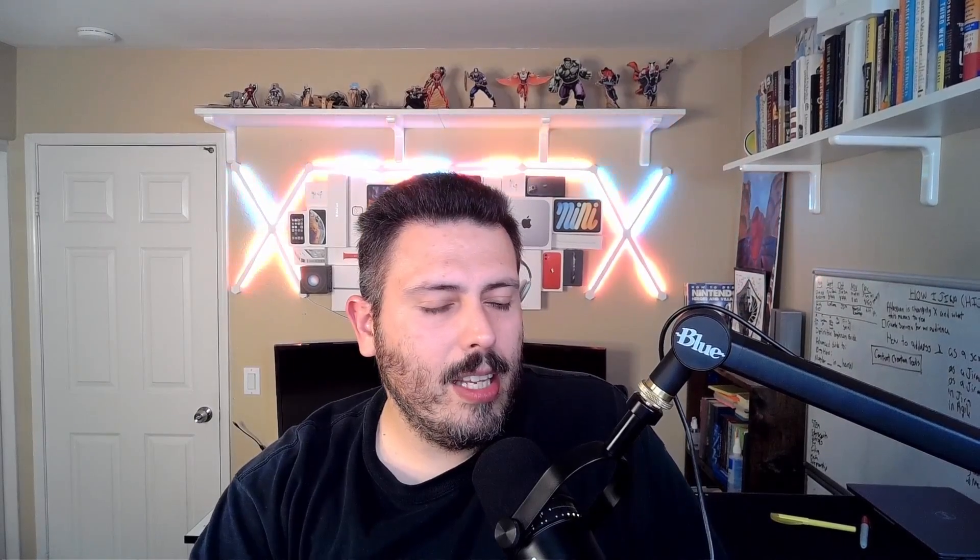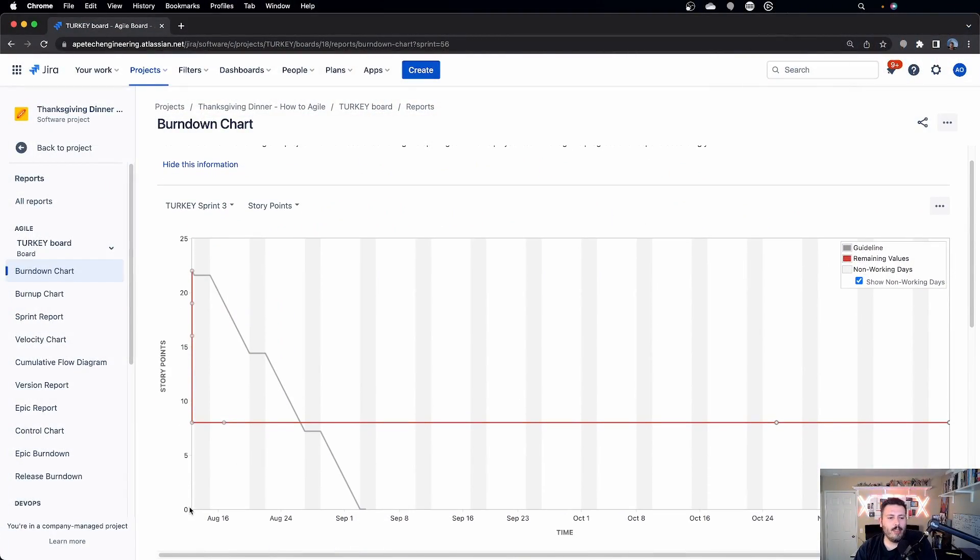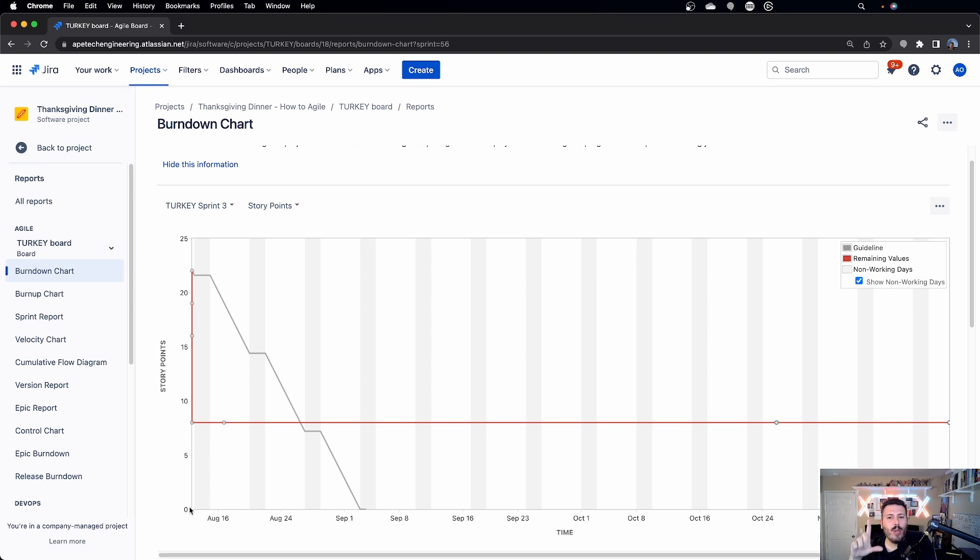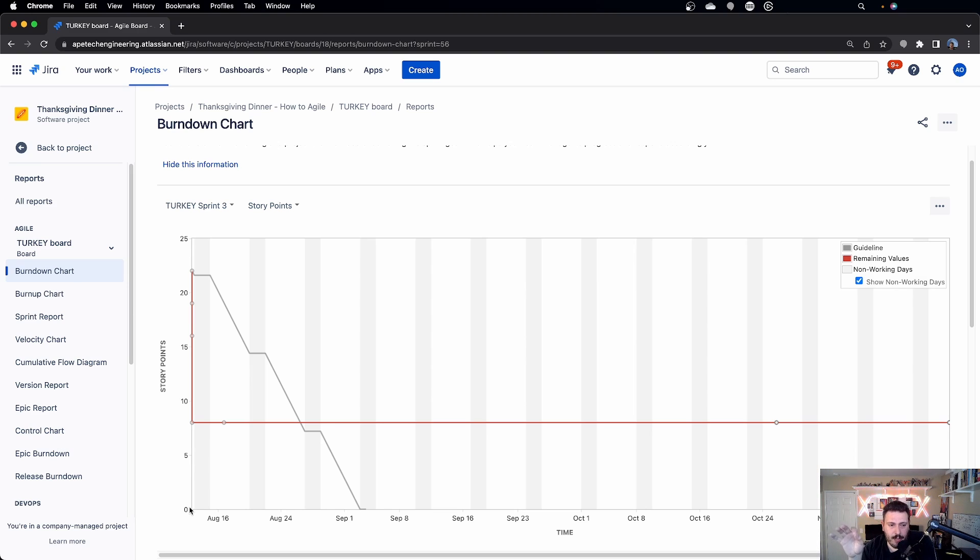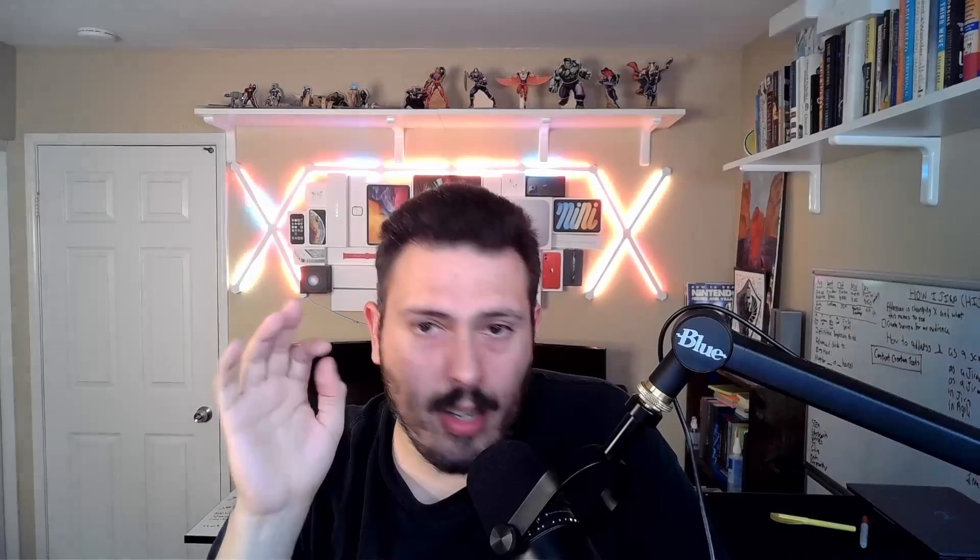Other thing to watch out for is if you see that your sprint starts at zero, that means that you as a Scrum Master did a pretty grave mistake. This means that you actually started the sprint without putting work into it, or at least without putting story points. So it'll be zero. Another thing for you to watch out for is a spike. If the red line, all of a sudden, instead of going down, goes up, that basically means that you're adding scope, which is the biggest no-no in Jira. It's okay to add scope every once in a while, but it's almost sacrilegious to add scope, and this is the biggest cardinal sin here. You don't want to be doing this. Whenever you can avoid introducing or increasing your scope, you want to not do that.